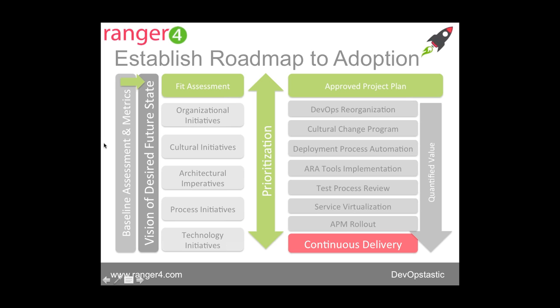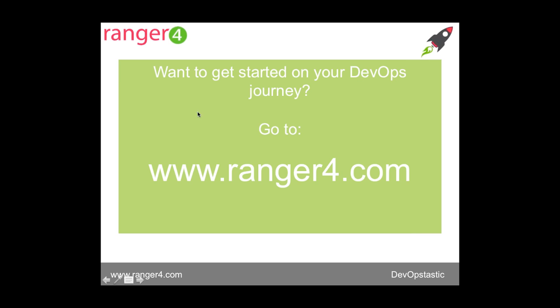So as part of the assessment process, what we produce is a roadmap to adoption, so to get our customers to their desired state. So as I just said, the first thing we do over to the left here is we baseline the existing state, and then we, with the project stakeholders, we visualise the desired future state. And I mentioned this is a 10-day bit of consulting. It normally elapses over a couple of weeks and has 2 consultants performing 5 days consulting each. So there's a day or so of prep, and then we start with a half-day project kickoff with the key stakeholders. And this is where we start really understanding where they're at and where they want to be.